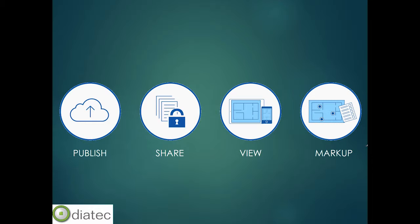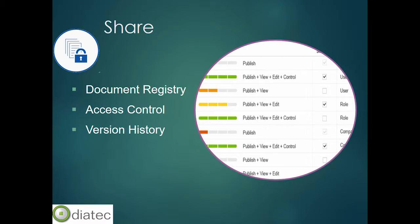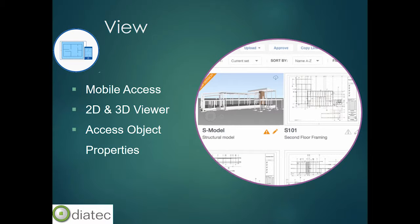Breaking these down: publishing centralizes all electronic information across a project into a single repository, making it easily available. Title blocks can be scanned to allow attribute extraction for coordination in the project folder structure. Sheet separation allows information within a drawing to be extracted into sheets, whether DWF or PDF. Equally important is access control — a document registry lists all project documents with dates and modification times, and you can specify who has publishing, viewing, editing, or control access to a particular folder or file. Version history is also available, allowing you to version files up and down.